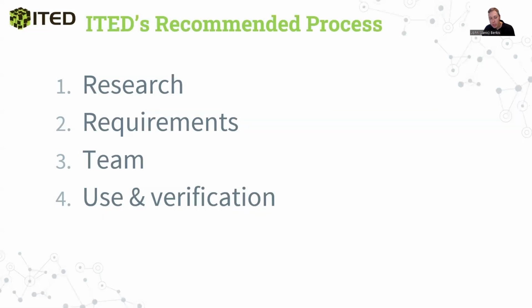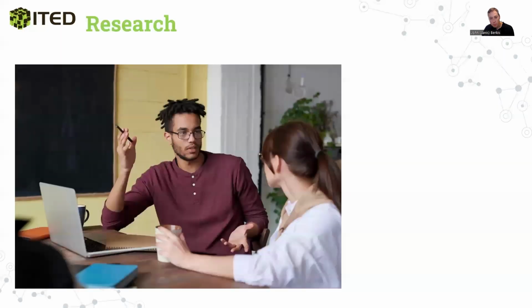If we talk about the recommended process, when we work with our clients, we typically say that it's this 4-step process you should implement to ensure that you gain real value from BIM on your project. So it's the research phase, writing clear requirements, finding the right team, and using and verifying the information. Now let me explain each step in a bit more detail.